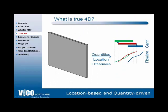In true 4D, when we connect the BIM we require information transfer — from the components and elements in the building information model, their quantities and locations, along with an understanding of the resources required for the methods we're using to create the building elements — driven into a location-based schedule. This transfer of quantities results in a more granular level of detail, allowing us to optimize the project in a planning sense and then control it on site. Let's see how this additional data alters our understanding of the plan, going from the Gantt chart down to the flowline.